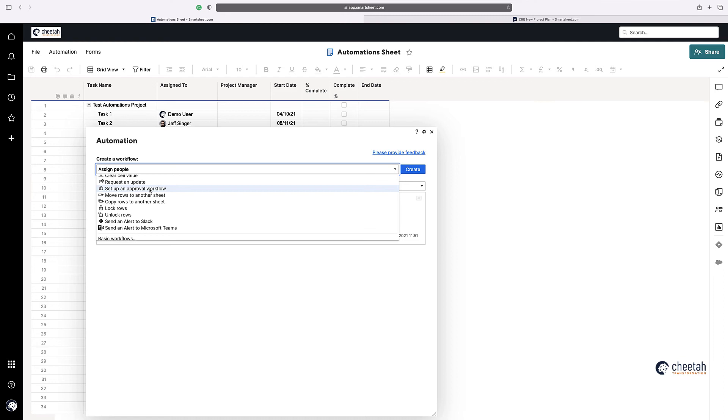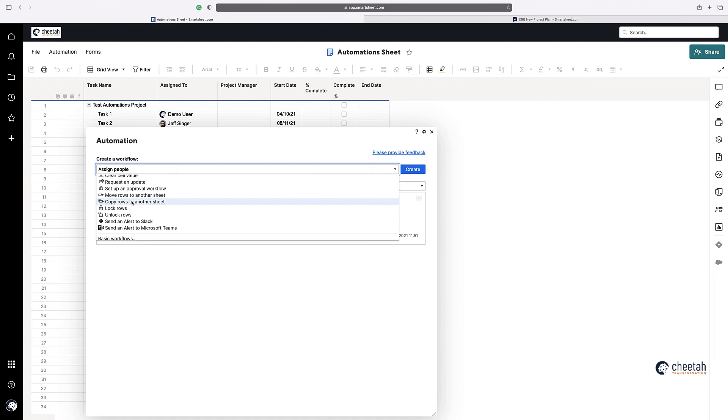Other simple ones we have here are moving rows to another sheet and copying rows to another sheet. Again, these are quite powerful in regards to what they can do. The only thing I would say is they're not reversible. So be very careful in regards to how you set these up. Normally, when I do it within a sheet, I'll have a separate checkbox, which is saying, so there'll be a condition in here saying, if this item is 100% complete, but this box is also ticked, then make sure that you copy the row or move the row.